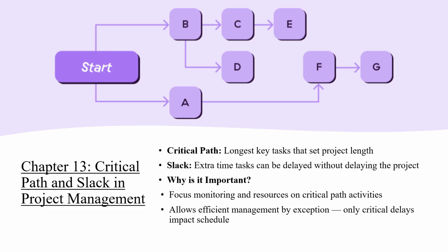Now that we have set the schedule and have the bottlenecks identified, we must outline those bottlenecks as part of the critical path. The critical path is the longest chain of tasks that determines if a product will finish on time. Tasks on this path have little to no slack, so delays might delay the whole project. By mapping this information visually, it allows managers to watch critical tasks closely and add slack or more resources to a task if it is running behind. More resources could be anything from additional human capital or a new machine on a critical component.